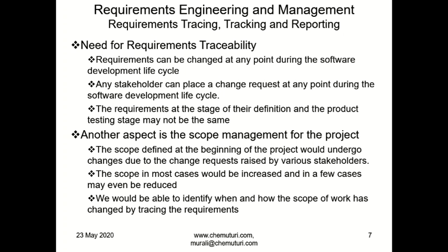Another important aspect of traceability is the scope management of the project. The scope keeps on increasing because of change requests, or the scope may also decrease. So at the end, if we are reconciling the scope defined and the scope delivered, we need traceability.